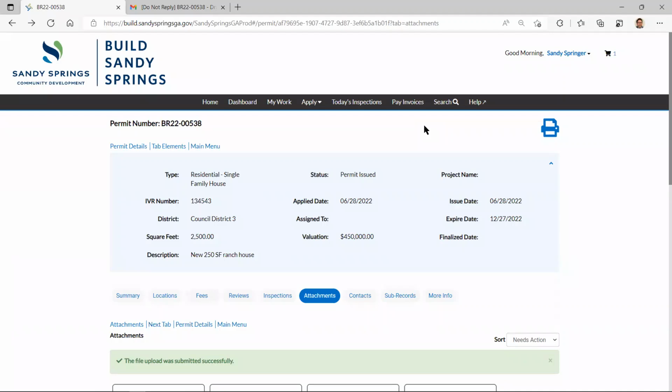So what happens sometimes is, say you're allowed 35% lot coverage for a residential property, pretty common for an RD18. And some people will get right at 35%. And if you do an addition or plan mod, now you've just gone over that. And then we have a problem, right? Or maybe you were right at 34.5 and then your plan mod bumped you over. So those are things that we want to catch during the plan mod. That's why we want you to submit those drawings, because we'll check some of that stuff. So that's what the as-built survey just verifies: dimensions, placements, make sure you didn't build it over the setback line.